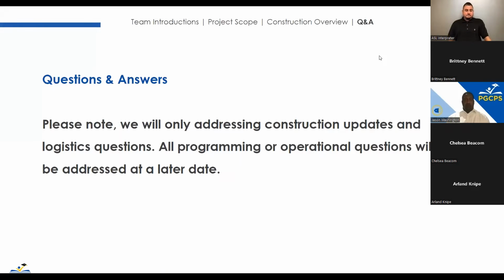Thank you. We've been asked, please repeat the opening date for the new school. Occupancy is scheduled for July 15th, which will give the administration and teachers and everyone time to get situated in the school before it opens. It will be open beginning next fall, so there will be no more swinging of students as has been the case for the last couple of years.